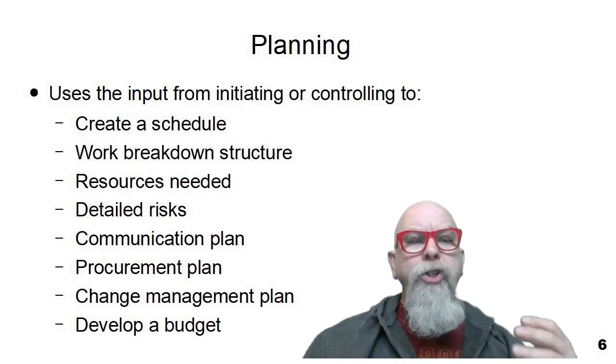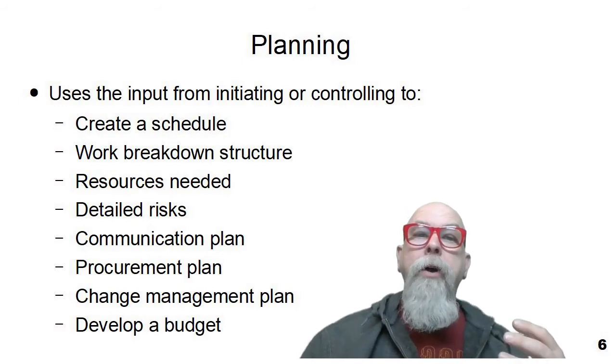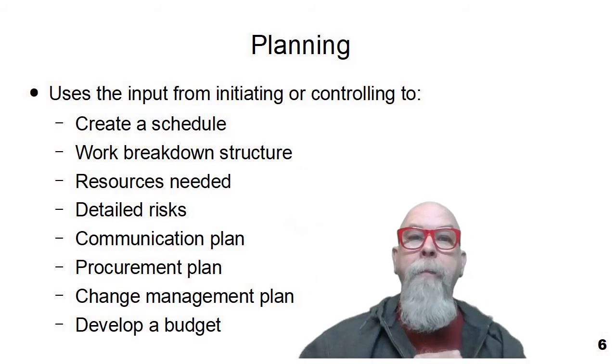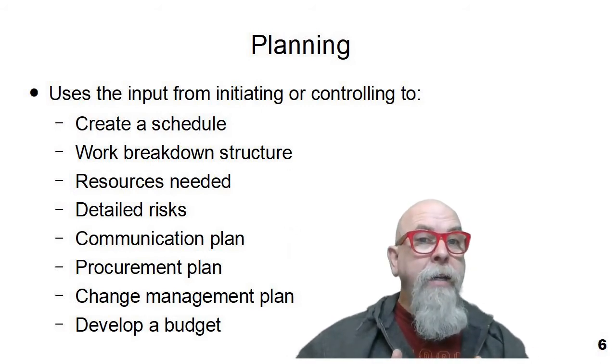We should create a change management plan here in this planning phase, which describes what we're going to do when changes happen to our project. I've seen very few projects that happen without changes as we live through the life of the project. Maybe something was missed in initiating.